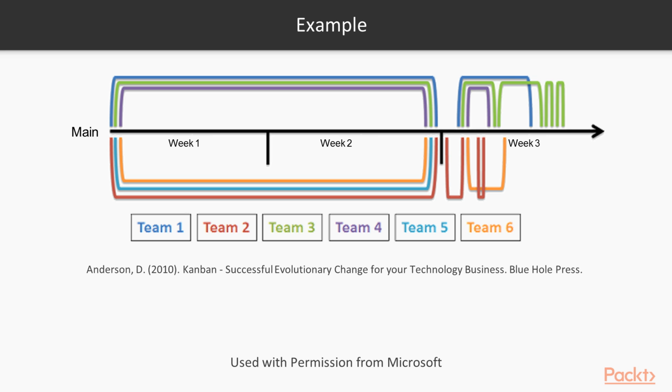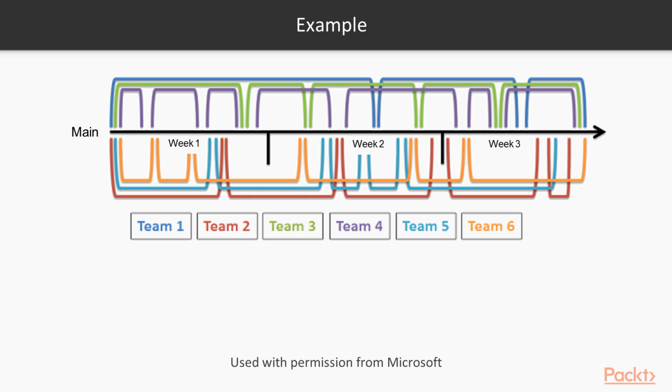Now let's look at this in a way of applying lean. Instead of waiting 2 weeks and then doing an integration sprint, in this case, teams are delivering value whenever it's available. And those teams then can work on the next item. So in this case, they're using the Kanban to continuously deliver value, which could be over a large period of time or a short period of time, depending on the size of the feature they're implementing. And then the integration and the work and the dependency is done by the other teams when that's delivered.